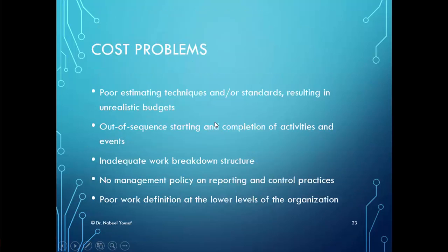Some of the problems that will face project managers are poor estimation or poor standards, which will lead to unrealistic budgets. Out of sequence activities also could lead to a problem, which will start and be completed but not following the planned sequence or the planned time.